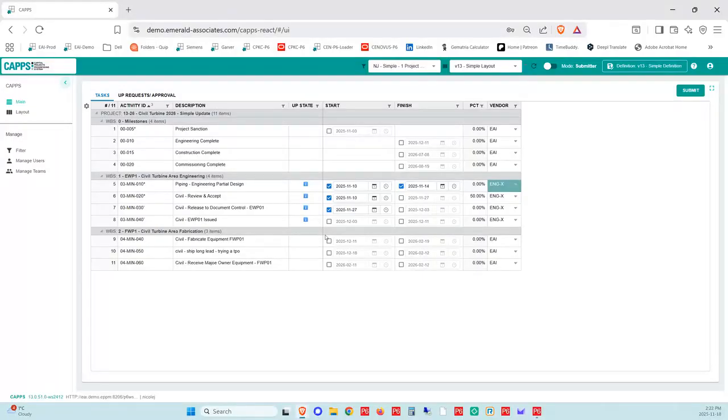All right, so in terms of updating, I can click on the field and I can choose the date. All right, so I can choose the start date. Now, if you work in hours, you can also use the hours field. You can see that our default is it's starting things at the beginning of the day. It's going to finish them at the end of the day. And the end of the day and start can be configured. Okay. So that's starting a milestone.